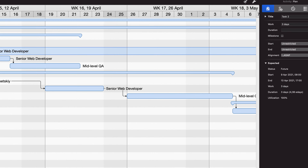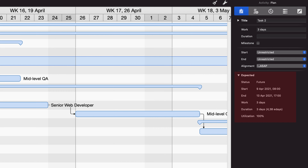Now, tips and tricks from practical experience. The first thing to understand is that a Gantt chart is a tool for visualizing your schedule and estimates — it's great for reporting and high-level stakeholder overviews. But for actual schedule management, use other metrics. As a project manager, track the planned start and end date for each task versus the actual start and end date. You need to know whether you started and finished tasks on time, because any variance signals a problem.